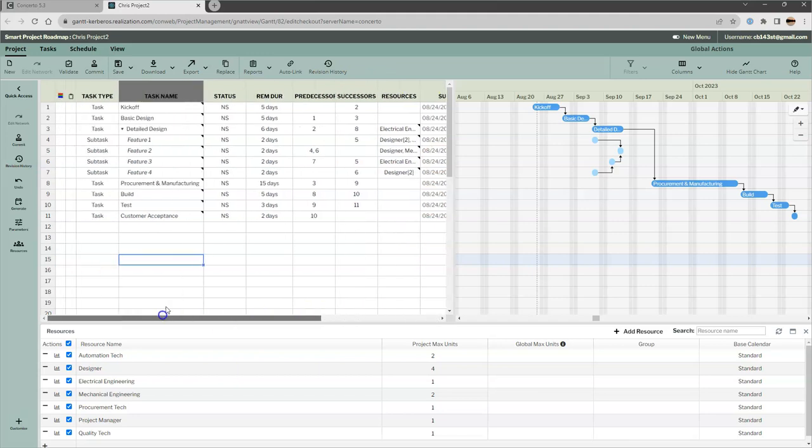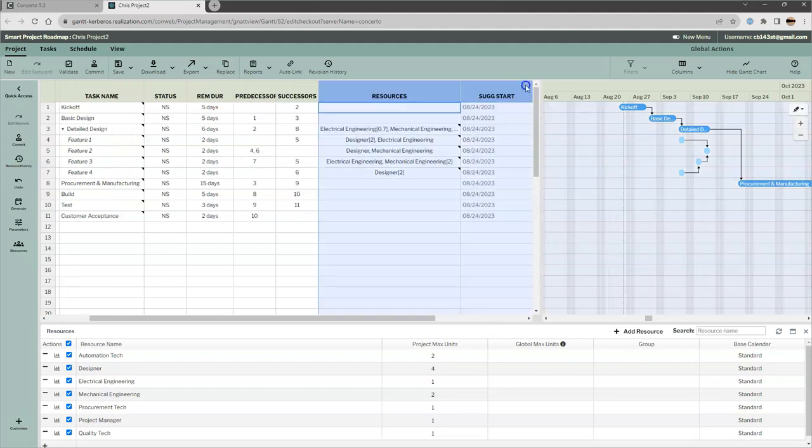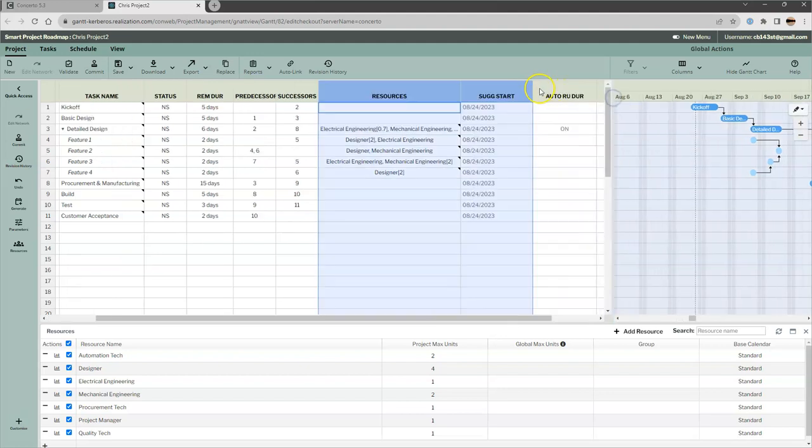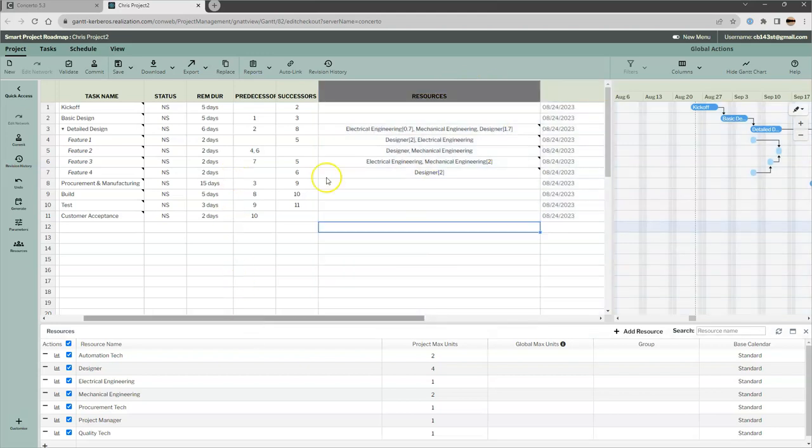Alright. So the roll-up, let's look at the roll-up that occurred here from these subtasks to this Tier 1 activity. And let's just expand this a little bit so we can see everything in this box. There we go. Okay. So each of these was 2 days of duration. So designer 2, designer 1, designer 2. So overall, I need 1.7 designers on this flow, right?